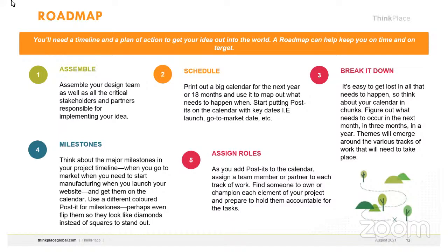It helps us as project managers to know how far a project is and how many resources we have used, and we normally try to update our Gantt charts every week or every month. Because the moment you're updating, it guides you on how far your resources have been used.